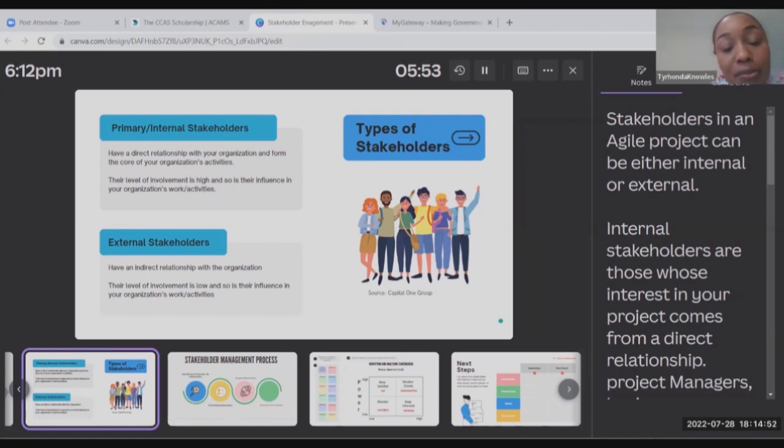So for example, the Department of Labor, but we also identified another key stakeholder that is external to the Department of Labor, but still an internal customer, the Department of Immigration, because the labor certificate is an output document from the Department of Labor, but it's used as an input document for the Immigration Department.